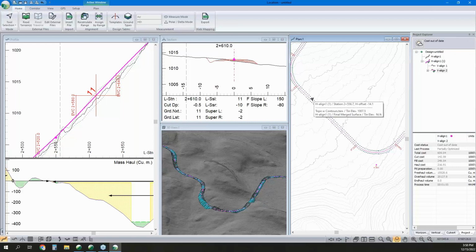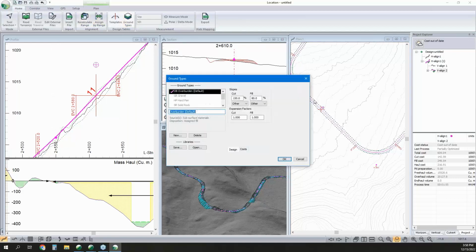So our next question, can RoadEng derive road reconstruction cost estimates for clearing, brushing, and ditching of old roads that are surveyed for rebuilding? Yep. So these costs that I introduced are related to earthworks quantities. If you're designing your ditching, you can figure out how much dirt you're pulling out of there, and it's included in your cost estimate.